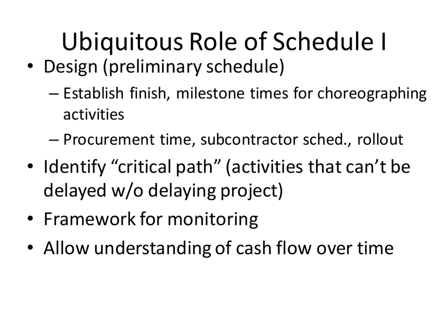But I think for the sake of this class, the key benefit that comes from this sort of scheduling is figuring out the critical path. And I'm not asking anything fancy from you in your projects, but I am asking you to think about what the critical path is. This is the set of activities, the sequence of activities that cannot be delayed without delaying the project.